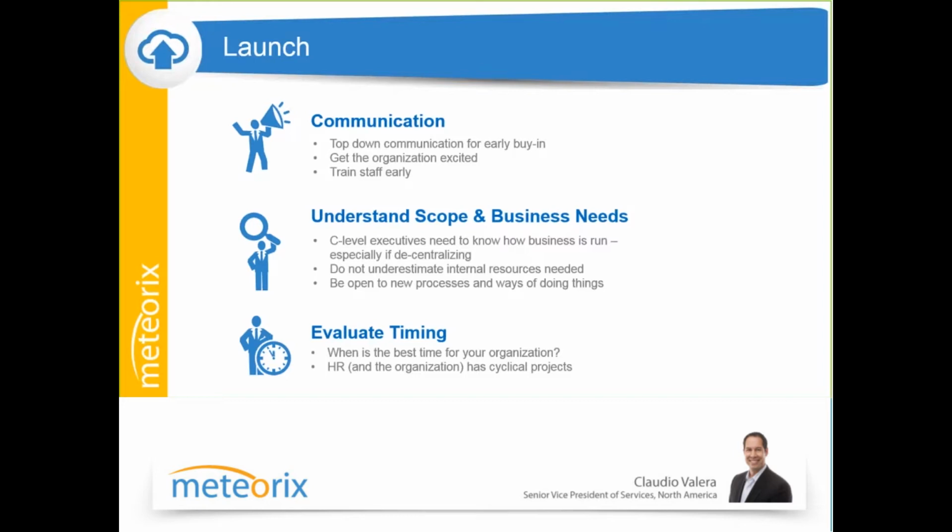There's a great graphic that I love when you look at your different owners. If you think of, for example, a y-axis that has power on it, an x-axis that has interest on it, so you have power on the y-axis, interest on the x-axis. The individuals in your organization that are either low power or have little interest are individuals that you want to monitor, and you're going to spend minimal effort on, but you want to make sure that at least you have a handle on where they are and how they're embracing this type of movement.